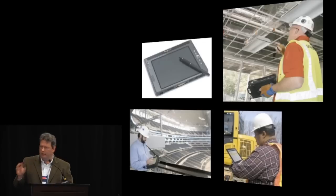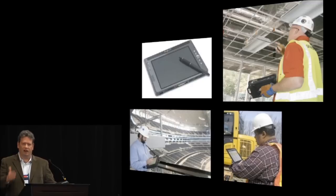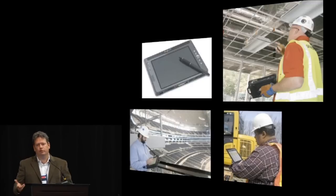The Trimble and Tekla combined have allowed us to do things that, as construction managers, we thought were impossible, like set 400 anchor rods on a project without error. A year ago, 2 years ago, if you'd asked me, could I take the time that we've budgeted to torch base plates on steel columns, cut them off, refabricate them, hammer anchor rods back into place, re-drill them out of the equation of construction, I'd say, no, it has to be in there. That's just human error that's going to occur.